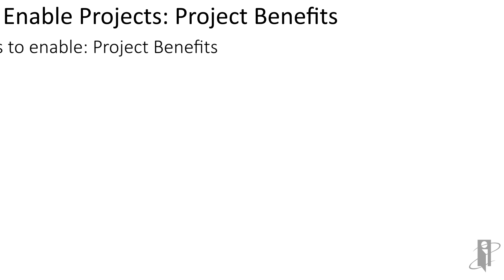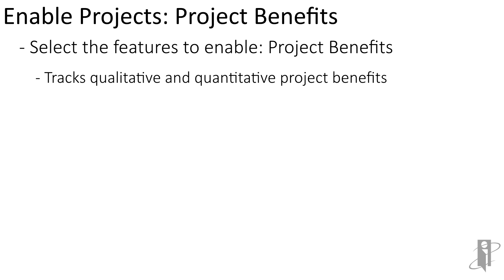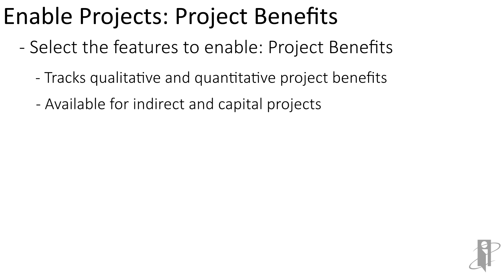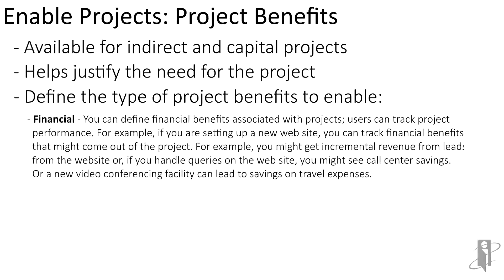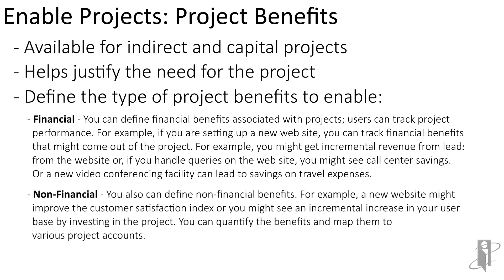You can turn on or off project benefits. If you just want to capture project financial details, you don't need to do this. But if you want to explain the benefits you expect to get — maybe a certain return on investment, an increase in customer satisfaction, or a reduction in supply chain costs — you can turn on, capture, and then track actual versus budget for all those project benefits. Within project benefits, you can separate out financial benefits such as dollar savings or increased revenue, and non-financial benefits such as an increase in customer satisfaction or number of leads. Project benefits help you justify the need for the project and look back later to see if you got the benefit you expected.